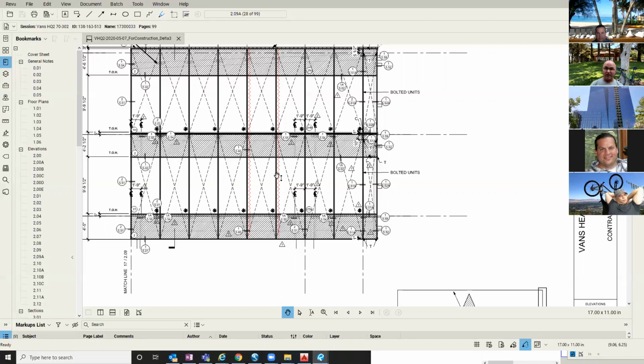But if you develop it at the beginning and it's included in that family request, it should be pretty straightforward for the drafter to include the 1 and 2 on 560 right next to each other, paste those details on their sheet, and then Takeoff has what it needs in order to make those units distinct from each other.